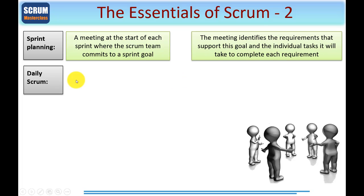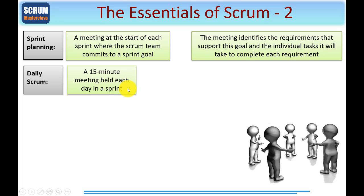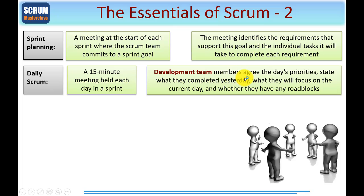The Daily Scrum — normally a 15-minute meeting held each day in a Sprint. It's been found that it's best to do this standing up if possible, possibly in a small meeting room with someone taking notes. You go around the team members one at a time: checking what's been achieved, what hasn't been achieved, what each team member is going to be working on for the rest of the day, and any impediments or issues that need to be resolved. The development team members agree the day's priorities, state what they did yesterday, what they will focus on today, and whether they have any roadblocks — also called impediments, or what you and I would know as issues.